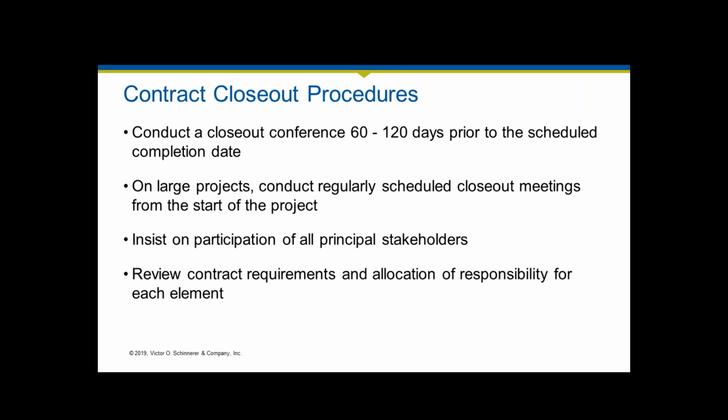contractor and the owner, how are we going to get to this substantially complete phase that we need to identify, so that you can say, hey, at this point, the project has progressed to the point where it is sufficiently complete so that the owner can start utilizing the project for the purpose for which it is intended. That is what substantially complete means, and it means something in the industry. It's oftentimes defined in your contract. So the goal is to, okay, at what point are we at substantial completion? This has a lot of implications for both the owner and the contractor.